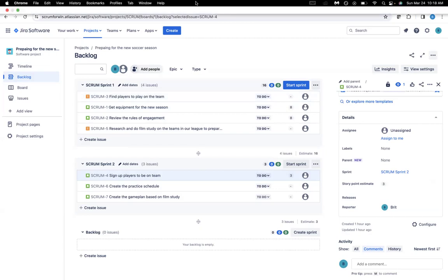Yeah, so for me in that situation, honestly, I would stay away from the numbers, and I would just say we base it off of our team velocity. I would go into, hey, we look at velocity based on the past 3 sprints or past 5 sprints, and that is what we use to determine how we're going to pull in stories.